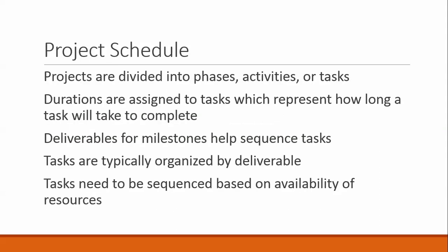So, project schedule. Projects are divided into different phases, activities, or tasks. And what we do with these activities or tasks is we assign durations, how long we believe it will take us to complete that particular task. We organize tasks in milestones, and milestones typically represent a deliverable within the project.